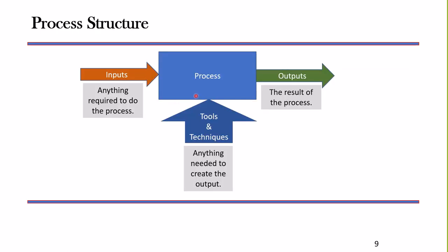We are a process-based project approach. Each process delivers something useful for the project. For example, take the process called identify stakeholders. The purpose of that process is to identify the stakeholders we have for the project, who will be providing us with the requirements and the other foundational information that we need to be able to develop our plan and execute